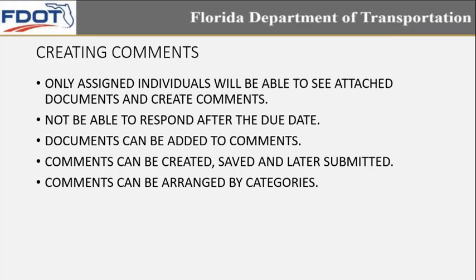Actually, the due date is set. You have to respond before the due date. If you run past the due date, you have to request an extension. When you respond to comments, you can add documents to reinforce your point. Comments can be created, saved, later submitted, or they can be submitted at once. And you can arrange them by categories.